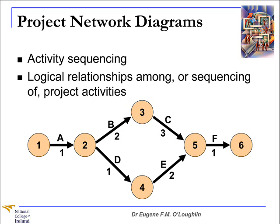Each arrow represents an activity, and each node at the beginning of the arrow — let's take a look at activity A — has node number 1 at the start of the arrow and node number 2 at the end of the arrow. This tells us the sequence of activities. So A is followed by B, which in turn is followed by C, which in turn is followed by F. Similarly, there's another path through this diagram where A can be followed by activity D, which is followed in turn by E, and finally followed by F. So this project network diagram, at a glance, lets us see what the sequence of activities through this project are.